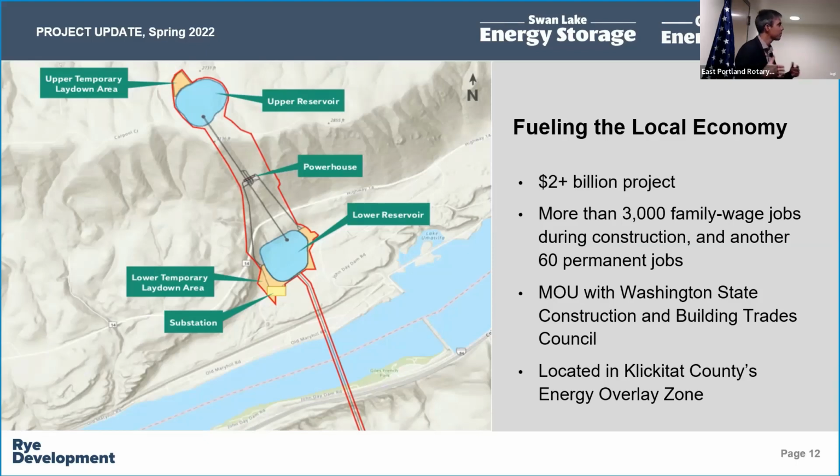So to speed up my story here, we did a bunch of well pump testing that was overseen by Water Resources. And we had a lot of volunteers down valley that thought when they pump these wells like this, we're going to see incredible amounts of change in our wells. And there were no changes determined at all in any of the wells down valley when we did the pump tests to support the application. One of the primary reasons is that these wells are already there. These are existing groundwater wells. We just did a transfer.